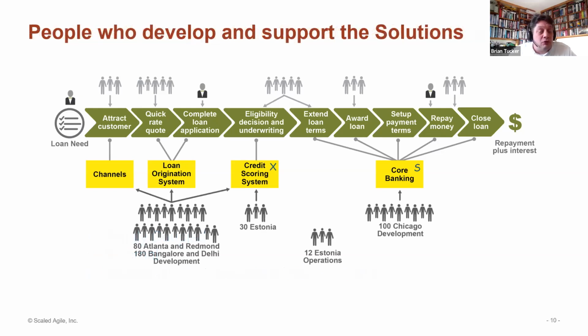Find everyone that's involved in improving those systems and keeping them running. Get the raw numbers, but don't worry about the size at the moment. Ignore existing organizational structures. This exercise is all about who should be grouped to keep things working. Defer the compromises caused by corporate politics until later. Don't double count. If people support multiple systems, show them supporting multiple systems.